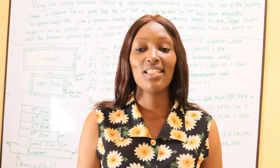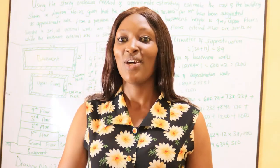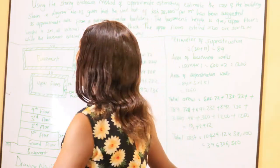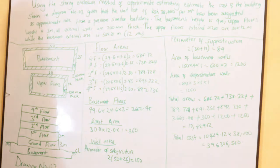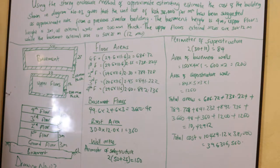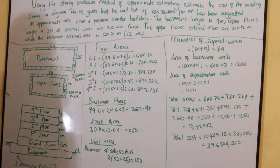You are asked to do a cost estimate using the story enclosure method. The question states: using the story enclosure method of approximate estimation, estimate the cost of the building shown in diagram three, given that the unit cost is 38,000 per meter squared from a previous similar building. The basement height is 4 meters, upper floor height is 3 meters, all external walls are 200 millimeters thick, the upper floor external sizes are 30 by 12 meters, and the basement external size is 50 by 25 meters.